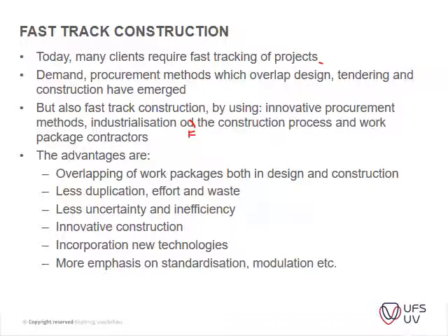So you can use all of these innovative methods. What we've done on certain projects is, in the tender document, we moved some of the design responsibilities towards the contractor. For instance, if it's a big mechanical installation, the mechanical supplier and installer actually does the design and the installation of the works, so you've got work packages like that that you just manage.